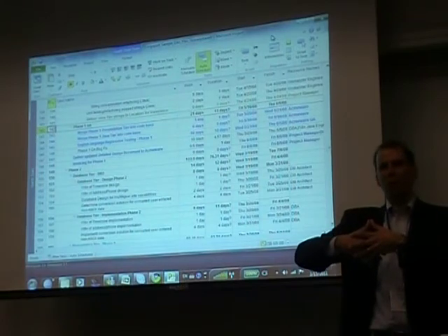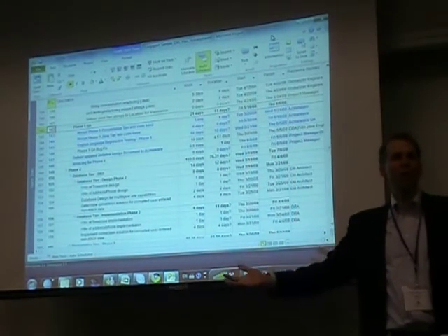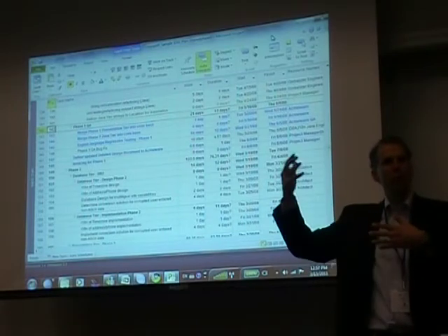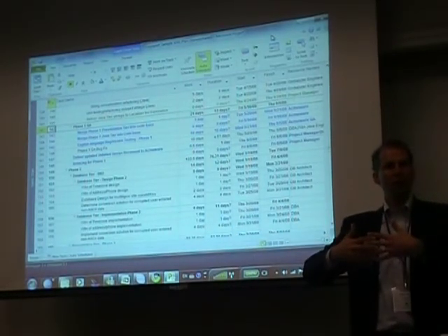Instead of this big merge at the end that would have a huge amount of files to be merged, we found a place where we could merge and start the development of the internationalization where we wouldn't break everything, and so we could get a running application between the new features and the internationalized features, bring them up and deliver. So instead of having, I don't know, 20,000 files that have been changed that you're merging in 5 different projects, you minimize that. So we go through phase 2, and it's much of the same thing.